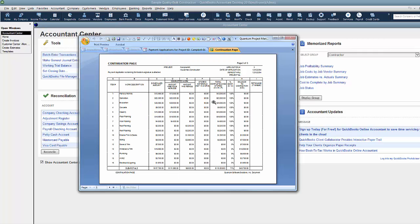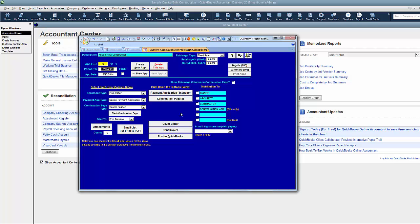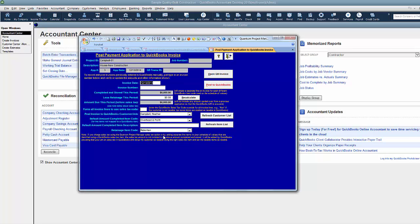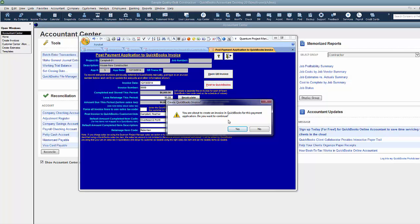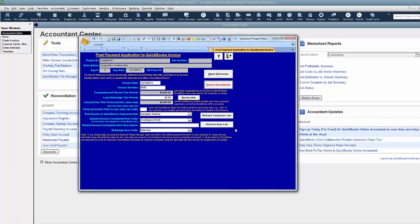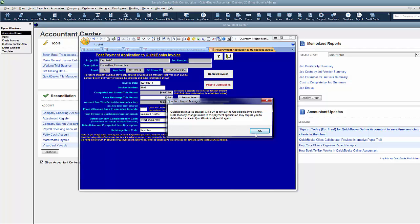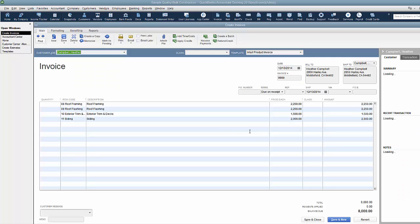So this should give you everything that you need to create professional invoices. However, it's still not inside of QuickBooks. So after we're finished printing, when we're finished with all of that, we'll want to post it back to QuickBooks. Posting it back to QuickBooks is almost a click of a button. Alright, so you can enter in retainage if you want. We'll definitely want to enter in the invoice number and there's not going to be any retainage on this one today. Be sure to add what your amount completed item is going to look like, what your retainage code item is going to look like. And then once you're finished setting all of this up, you can post it back to QuickBooks. It's going to ask you to confirm that you want to do this. We'll say yes and the invoice is in there. So let's take a look at what that did in QuickBooks.